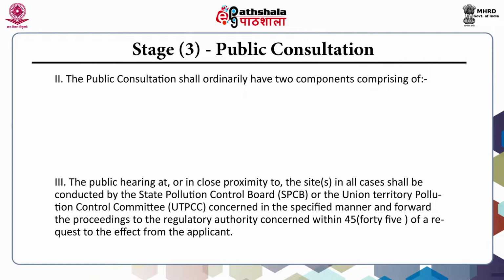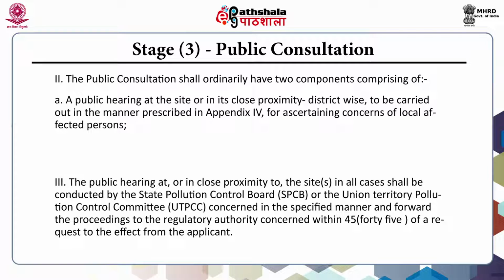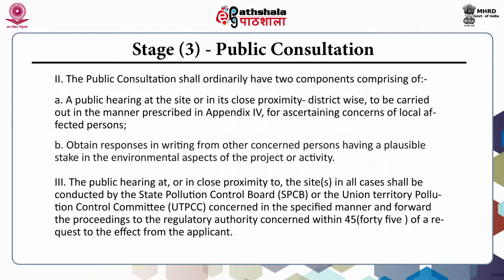The public consultation shall ordinarily have two components: one, public hearing at the site or in its close proximity, district wise, to be carried out in a manner prescribed in Appendix 6 of the notification for ascertaining concerns of local affected persons; and two, obtaining responses in writing from other concerned persons having a plausible stake in the environmental aspects of the project or activity.